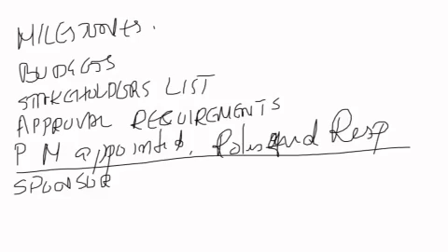In many projects we will have multiple project managers, like the client's project manager, contractor's project manager, consultant's project manager, and there is always this possibility of ambiguity of roles. So if you can define their roles and responsibilities very clearly here, then these ambiguities can be removed.